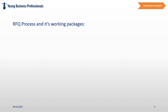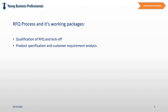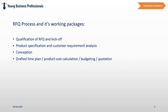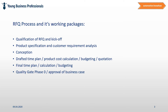The RFQ phase might be divided into the following steps: qualification of RFQ and kickoff, product specification and customer requirement analysis, conception, a drafted time plan creation, product cost calculation, budgeting and preliminary quotation, and also a final time plan creation, calculation and budgeting, a quality gate Phase 0, the approval of the required business case, and finally final quotation and project nomination. Let's take a deeper look at each of these working packages on the following slides.